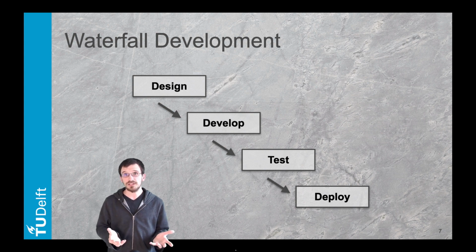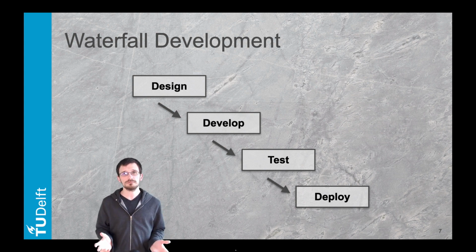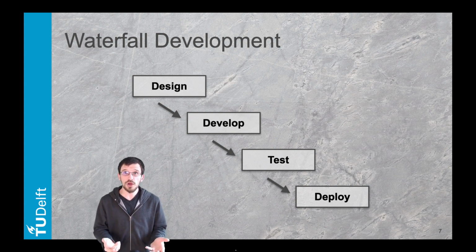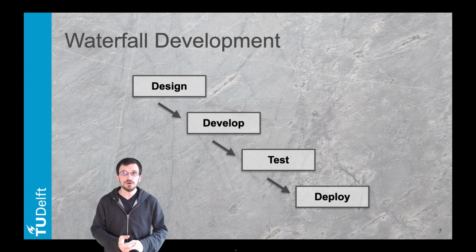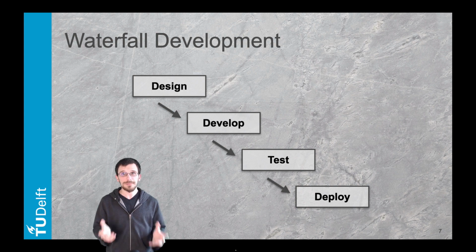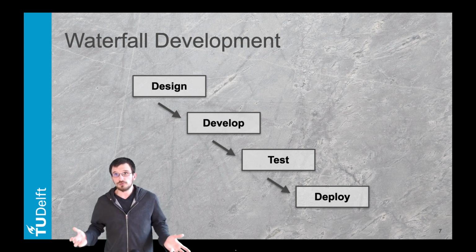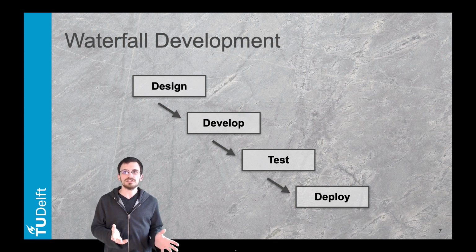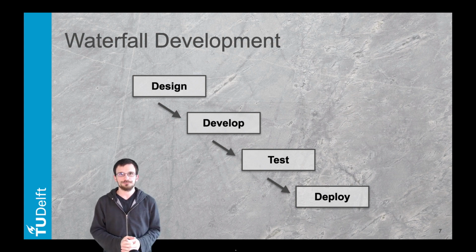There is limited space for new ideas throughout the process, as well as little customer involvement. We agree with the customers on what we will deliver early in the development cycle. We define the budget, the scope, and the time in the beginning. It makes planning and designing much more straightforward. We can develop the software entirely and more carefully based on a complete understanding of all software deliverables. It is easier to measure progress because we know the full scope of the work in advance.